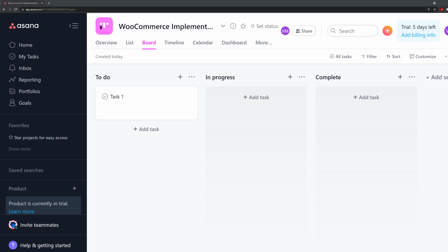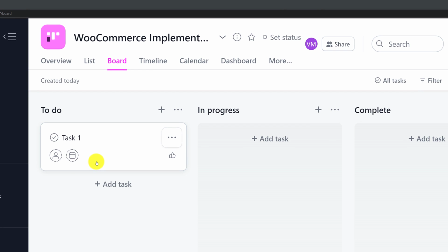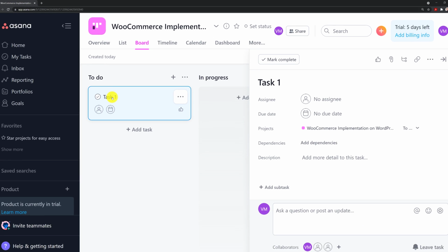Once you set up a new project in the tool, you get to what's called the Kanban view. You might have heard different terms for that, but that's ultimately the idea of simplicity. Kanban view works very well if you are just one person or if you have a small team. Let me explain. There are only 3 columns here: to-do column, in progress column, and then a complete column. For every task that you create, you keep all initial tasks in the to-do column. And in fact, Asana gives you a default task 1. You can add new tasks in each and every section. So let's see what we can do with task 1. I'm going to click on task 1 and make necessary updates.